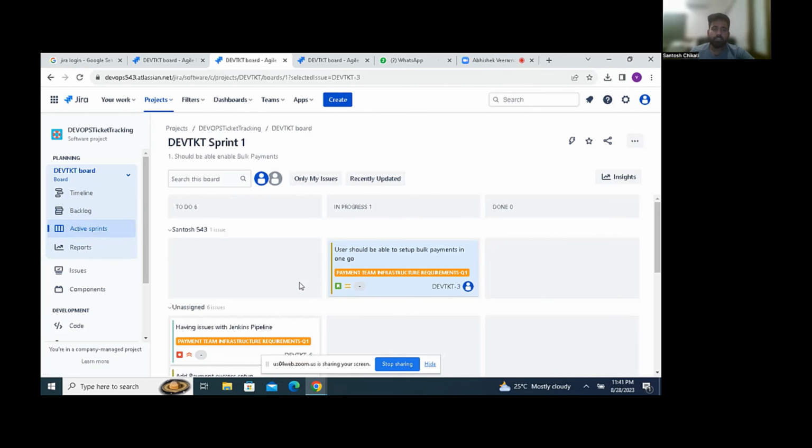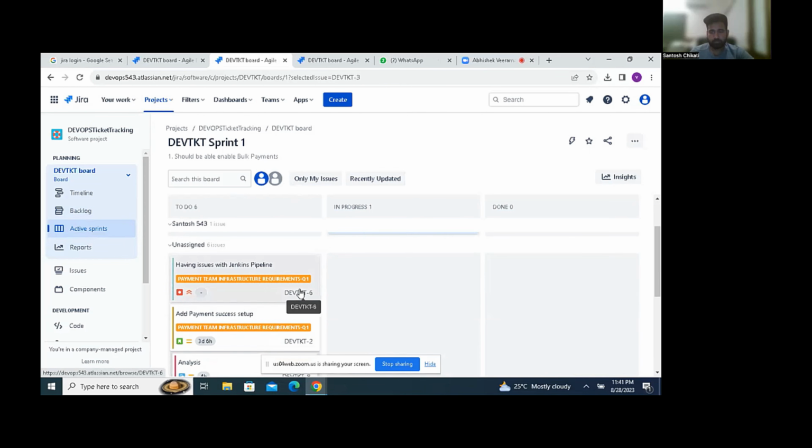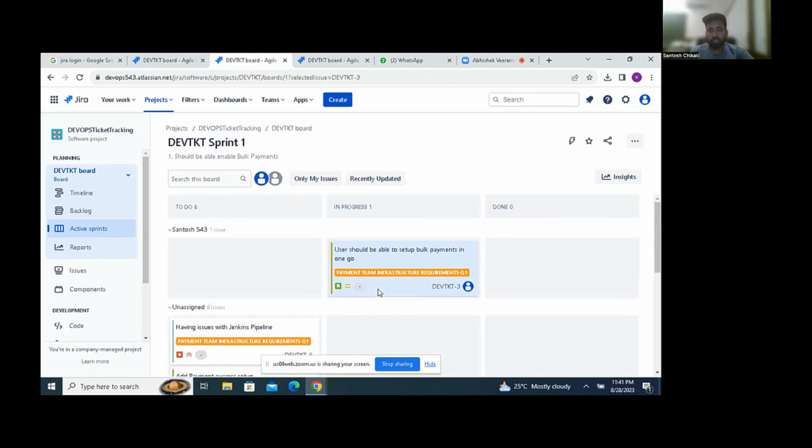In the mid-sprint review, they will review where we are with the sprint. Are we going in the right direction? Are we achieving completion of all the user stories? Are there any hard blockers, or is anyone in the team not keeping pace or not able to do the work? Or they estimated it as a three-pointer, a medium story, but now it's turning out to be a very large story, so they need to do something. A mid-sprint review is a very good ceremony to have in Scrum, so that though we have a daily meeting, in the mid-sprint review we can go through each user story.